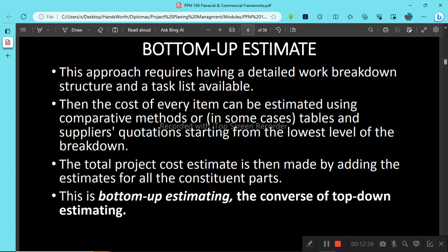If it is, then look at the people in your area that have built poultries holding 7,000 chickens, and find out how much they had to spend to build it. Once you know how much they spent in total, you can have an idea of how much you will be required to spend to construct that poultry. That process of estimation is what we are calling top-down estimation.